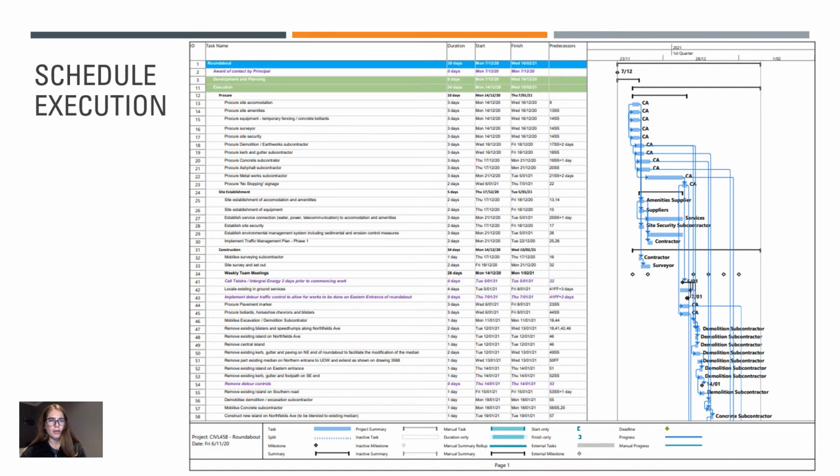This program incorporated a non-working calendar from the period of the 23rd of December 2020 to the 3rd of January 2021 and ensured inclement weather contingency was added. With these additions, it allowed for the contractor to exceed the target handover date and ensure they did not fall behind due to wet weather.